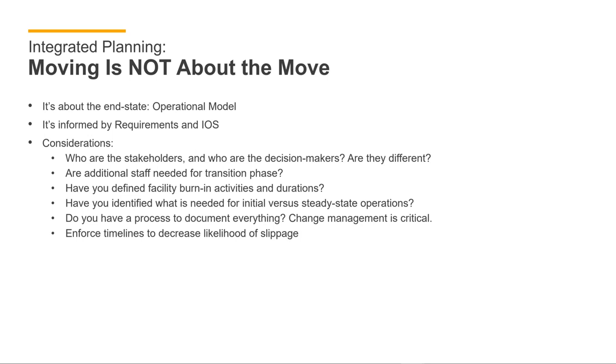In other words, this is your earlier milestone to say, yep, we've got initial capability versus what you want to have for true steady state operations. Do you have a process to document everything? Change management is critical. Can't really stress that one enough. If you don't have a good change management process, as you know, dozens or more stakeholders, decision makers, operators, as the requests, requirements, changes, et cetera, are coming up from all directions, how is that process managed?